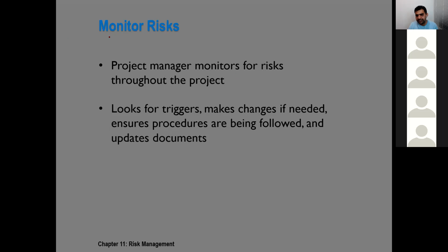Risk implementation and risk monitoring go together, because executing and monitoring normally run together. Here, the project manager and the team members are the risk owners. They keep on tracking and monitoring the risks. They also keep on looking at risk triggers. If there is a need to change, even in the risk trigger, they also change it.